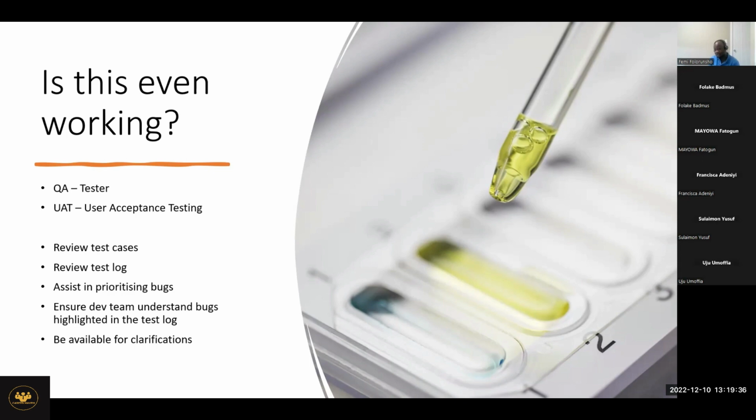The tester will retest those requirements that failed. And if everything is okay, the tester will provide a sign off: I, as tester, have reviewed everything. This leave approval application works fine. Good. This is a milestone. Now that from our project team, we think that it works fine based on the requirements, we need the users to come and use it.